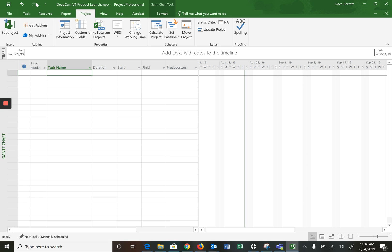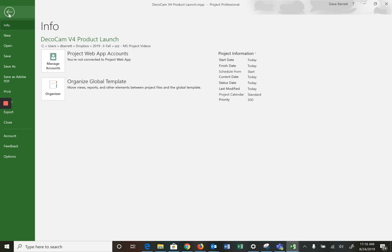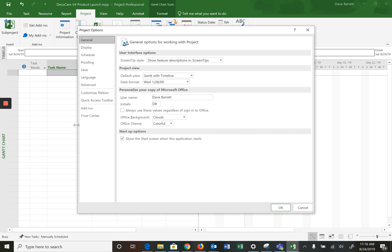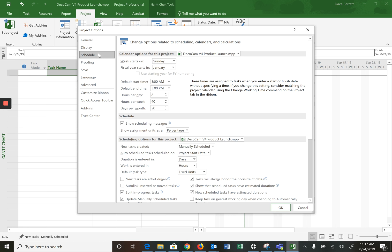The next thing to do is to go into File again and go into Options. There are plenty of options here, most of which you do not need to change. But the one I want you to change is under Schedule. There is a selection: New tasks created. The default for MS Project is manually scheduled — change that to auto scheduled and always do this for all of your schedules that you create.